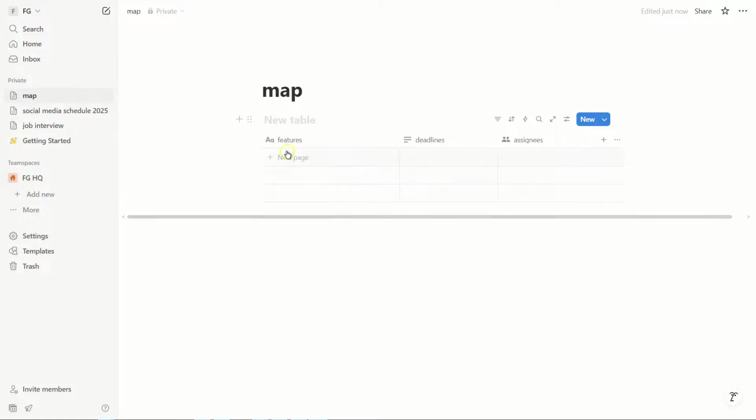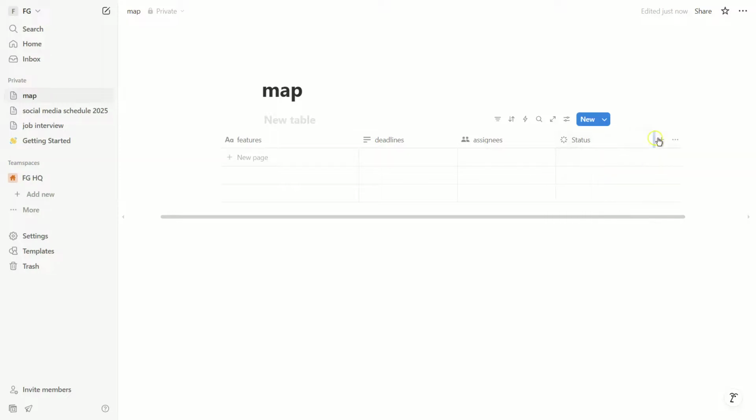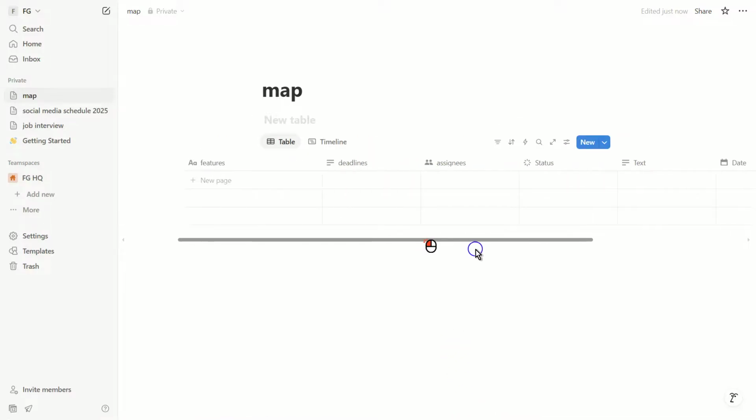Next, we'll use Notion's unique database features to manage your product backlog. The idea here is to create a database for storing and prioritizing all your product-related tasks. You can add properties for status, priority, and estimated effort. This helps us because it allows for a systematic way to manage and prioritize work based on business impact and effort. Here's what's happening behind the scenes. By using Notion's database, we're streamlining our process management, making it easier to view, update, and prioritize our tasks.